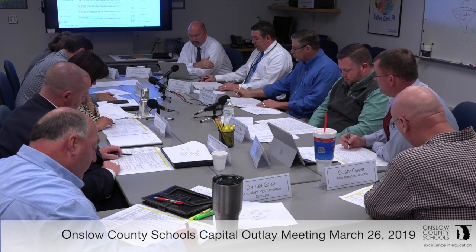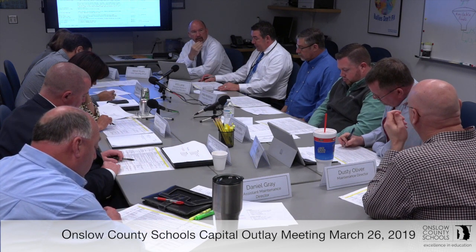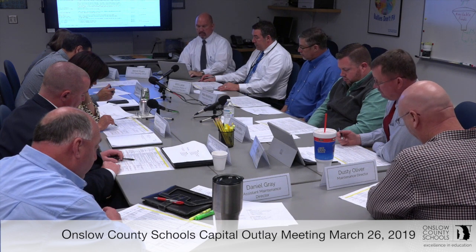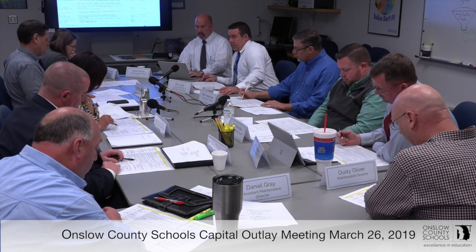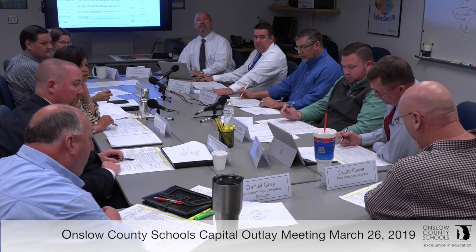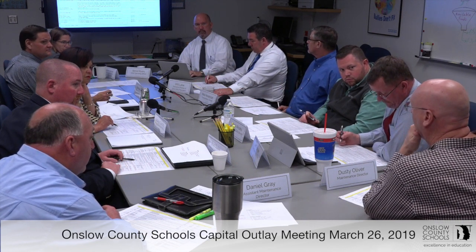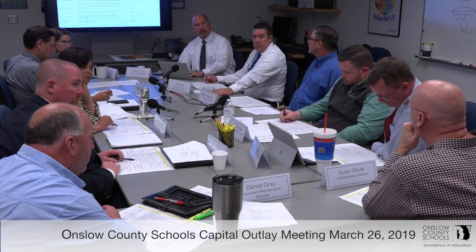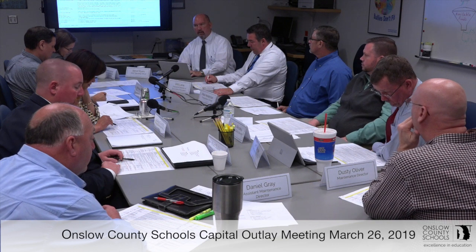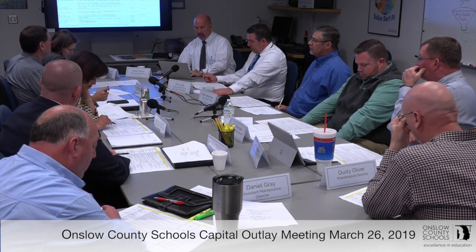Remove carpets, install tile in the kindergarten classrooms. Do we have tile underneath the carpets? We have to investigate. Sometimes there's tile there. Sometimes it was asbestos tile, and the carpet was just put on top of it. So it might be a little bit more to it than just replacing it. I'm actually surprised with the request to go to tile. I could see a request to replace carpet.